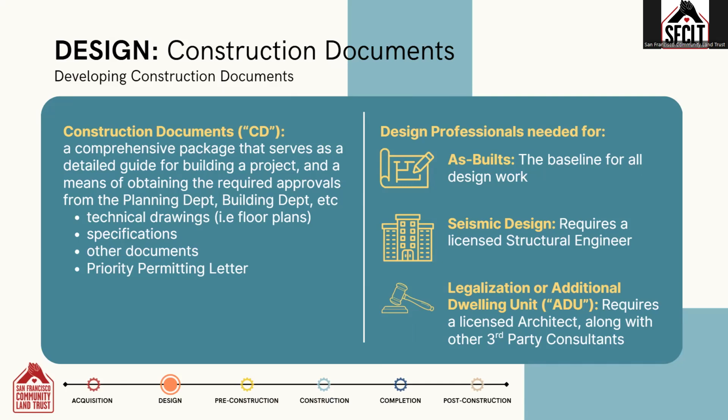If there's a structural element to the rehab, the construction manager will need to engage a licensed structural engineer. And if the scope includes accessibility design, a unit conversion, unit legalization, or an additional dwelling unit, an ADU, a licensed architect will be required, along with any third-party consultants that they may need to complete their permit package.